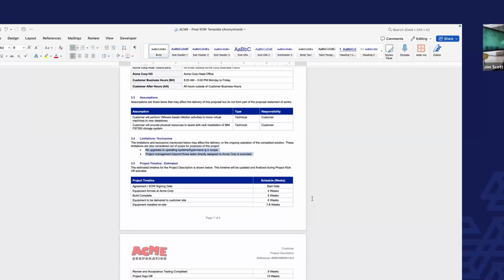Yeah. So pre-sales is typically the person or role scoping these projects. So it's not a delivery engineer, it's not a billable resource for the most part, right? So that pre-sales engineer is not a project manager. So I don't think that a pre-sales engineer should be committing to any sort of timelines other than we can start the project in the next couple of weeks or 3 weeks, right? Like don't commit to specific dates.